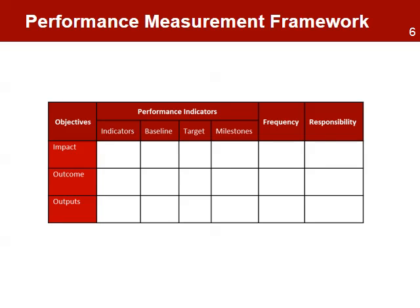In results-based project management, the logical framework matrix moves up one step further and incorporates some changes that will allow a better structure to manage and monitor the project. The performance measurement framework adds the following elements: a baseline, a target, milestones, frequency of creating the data, and responsibilities for collecting the data.